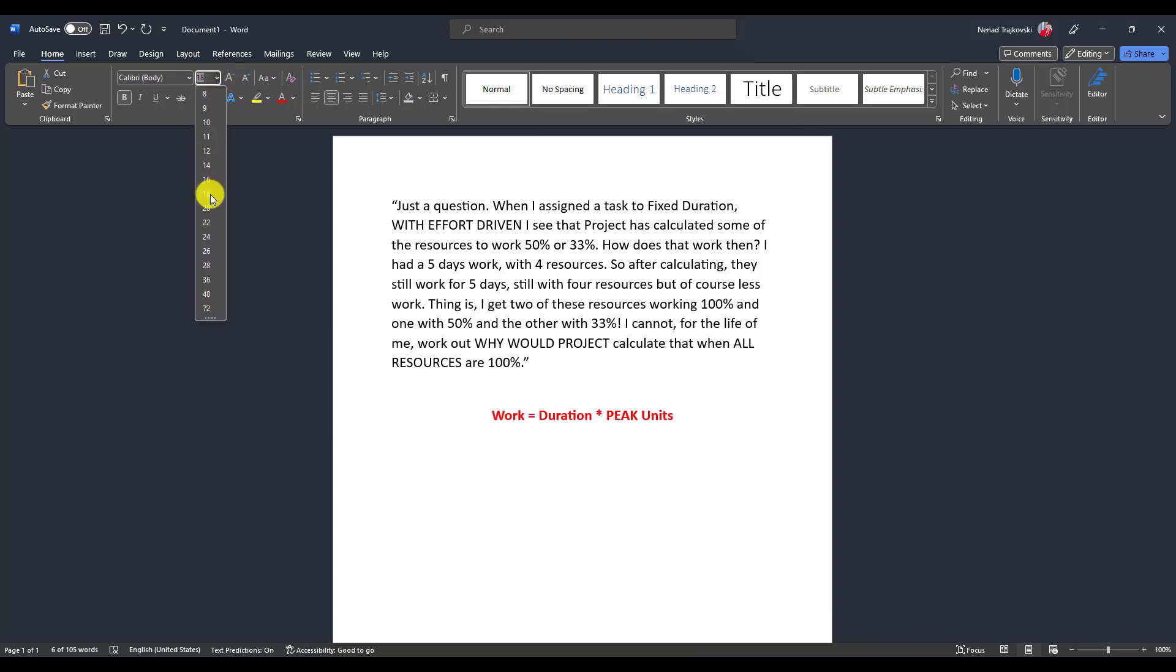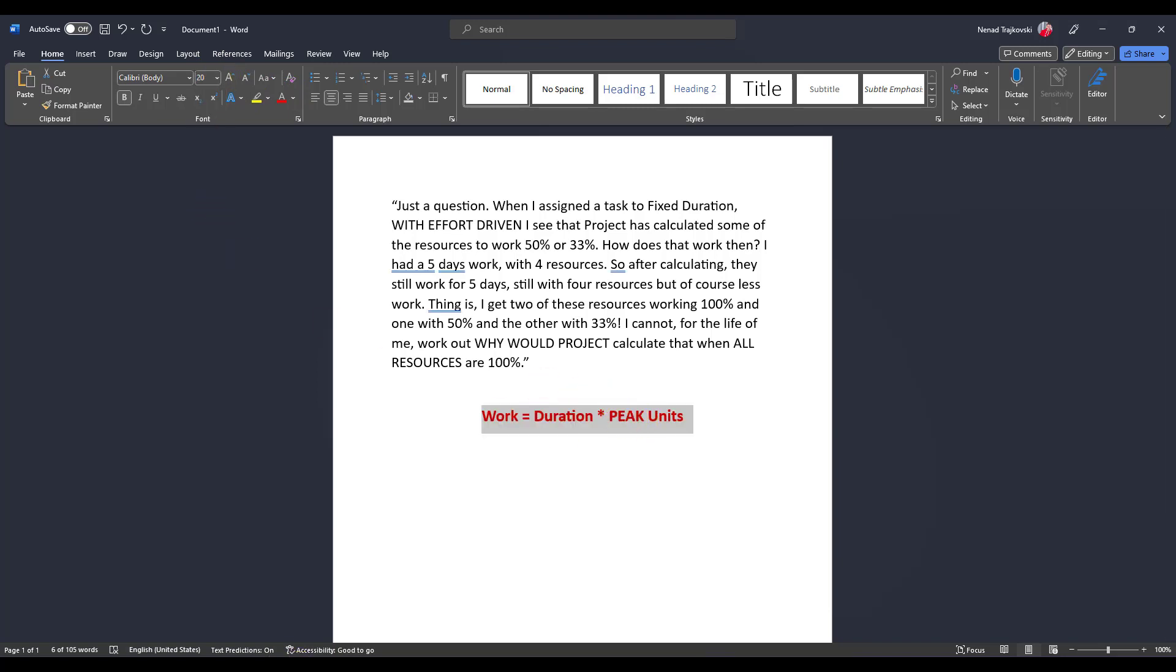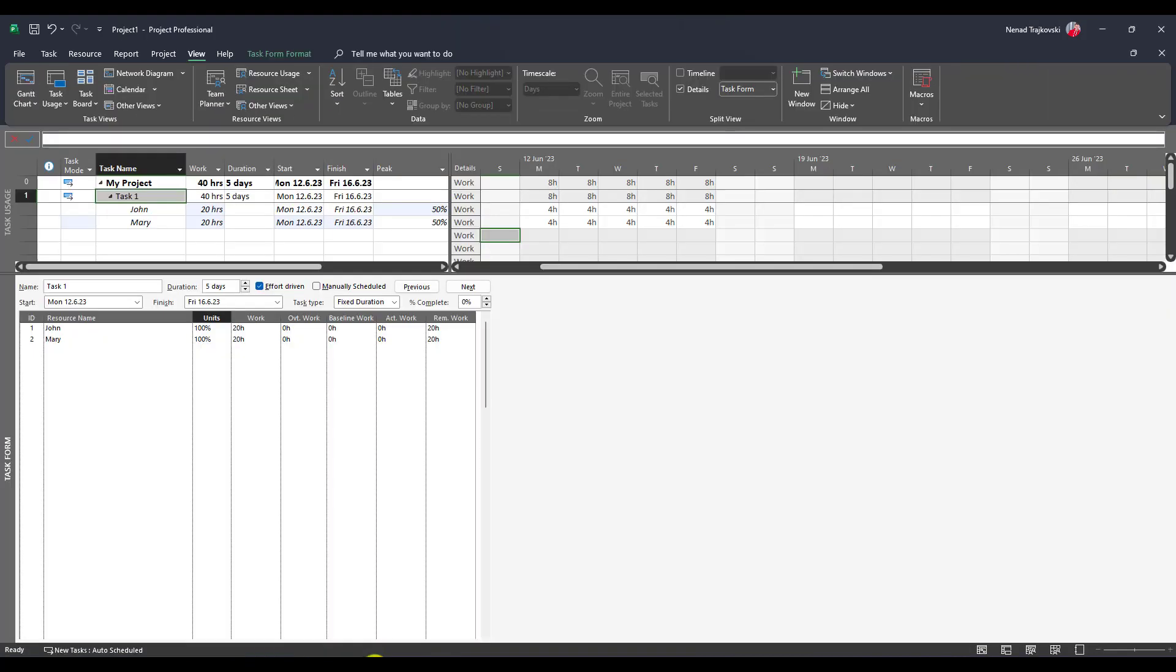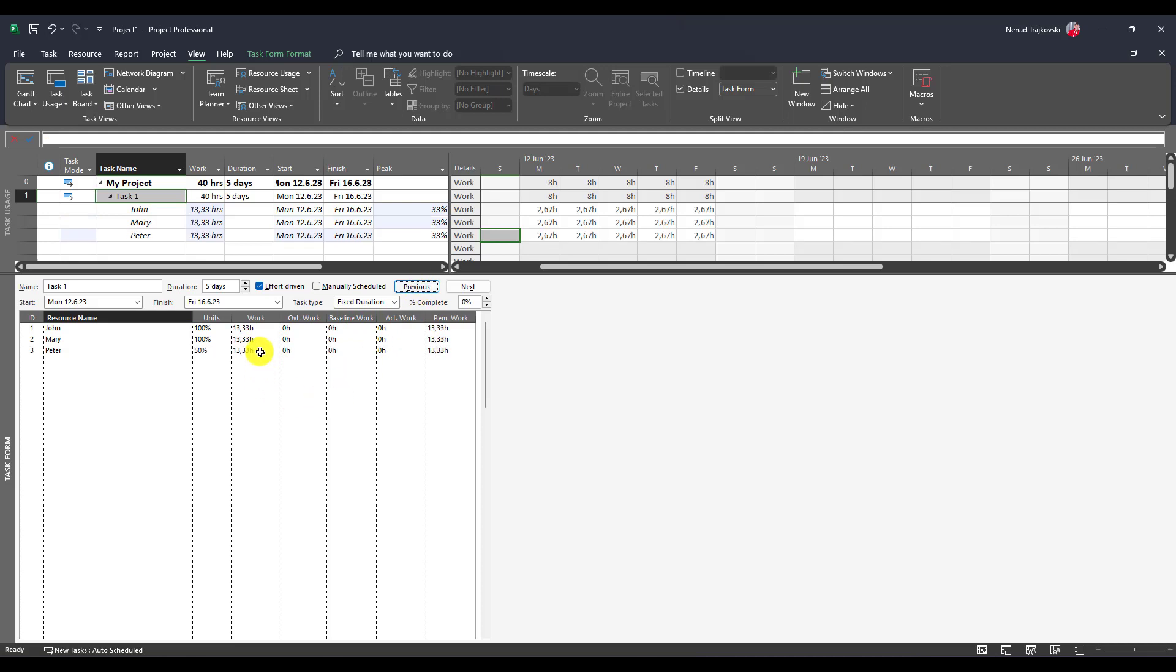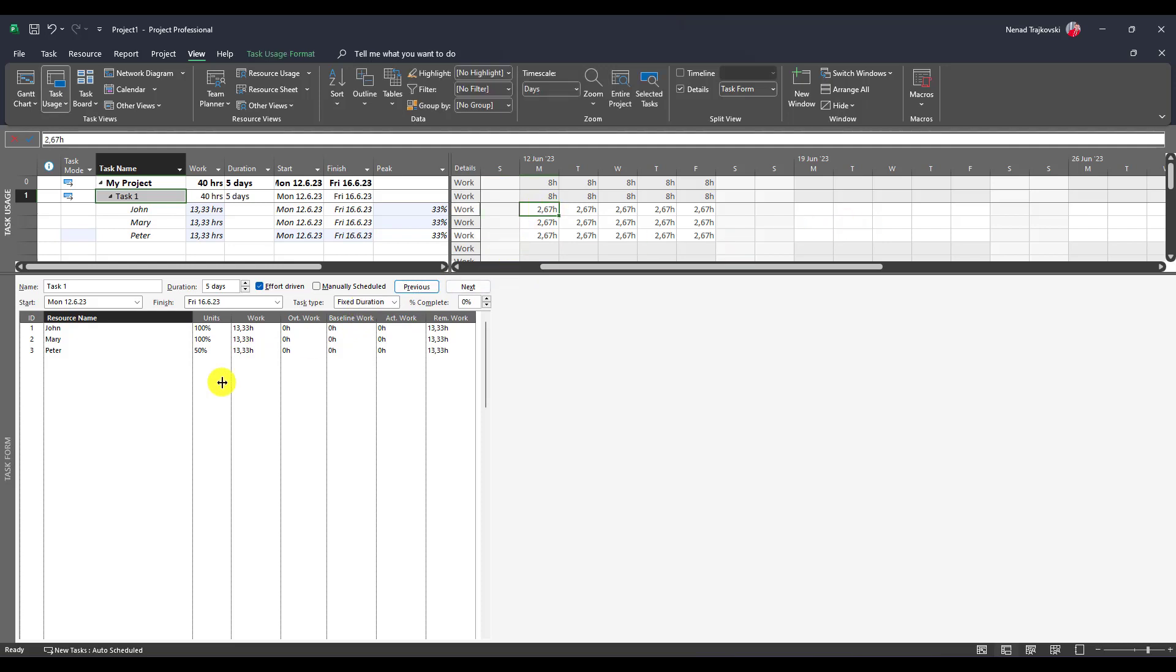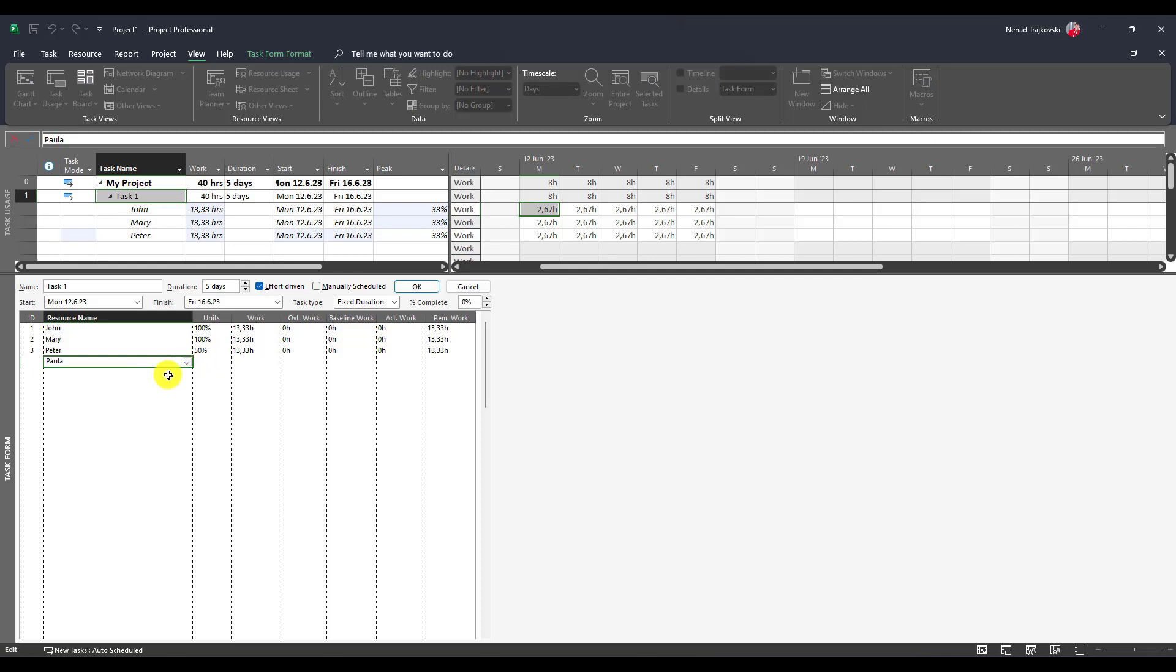Peak units. What is peak units? Let me finish my example and I will show you at the end. Now let's add Peter. Peter will split the total amount of hours—40 hours—among them, which is 13.33, which means that they are going to work five days. Why? Because it's fixed duration, 2.67 hours per day, and it has units 50%.